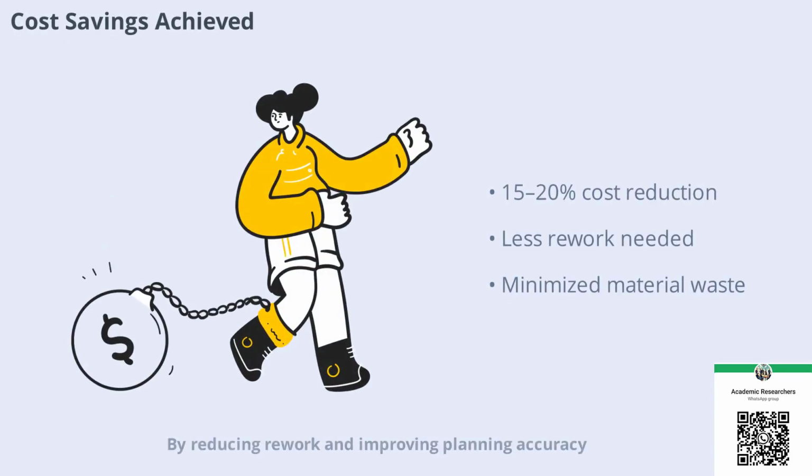By reducing rework and improving planning accuracy, ITCE contributed to measurable cost savings across the studied projects. Surveying and design-related costs decreased by 15–20%, primarily through reduced working hours and minimized material waste during construction. These savings demonstrate the tangible benefits of IT integration in civil engineering.